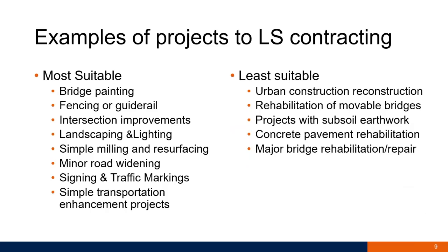The least suitable would be urban construction and reconstruction, rehabilitation of movable bridges, projects with subsoil earthwork, concrete pavement rehabilitation, and major bridge rehabilitation and repair. If we look at these projects, you would find that in rehabilitation projects, the amount of work that you do is usually not specifically defined.